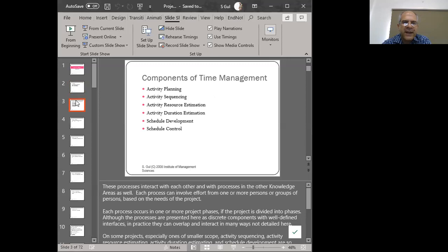These include activity planning, which is basically the idea of thinking about each individual activity by itself, and then determining how long that activity is going to take and how many resources, etc., we're going to have on it. The discrete set of concerns when planning an activity is that we're trying to plan when to begin that activity and the nature of that particular activity, right? So we're thinking about a particular deliverable, and then we're breaking it down into smaller activities, and we're saying that these are a set of activities that an individual or a group has to perform. So that's the idea of activity planning.